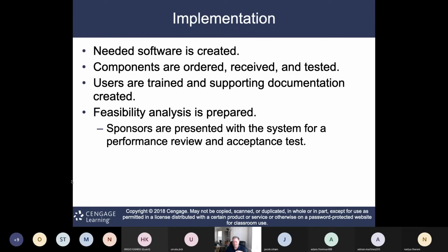This phase gets broken down into phases in most organizations, where you'll have your development, your systems testing, maybe even a simulated production, and then the actual production. So you may go through 4 different gates of approval processes in the implementation phase of the project. But you definitely should be doing a performance review and acceptance testing for any major changes, for sure.